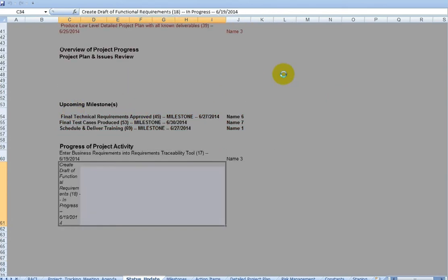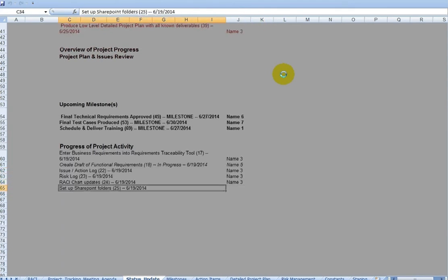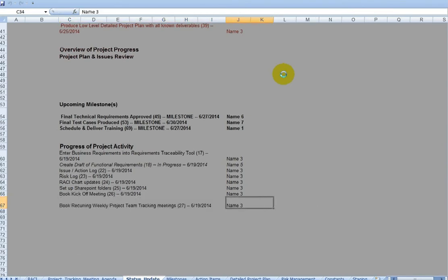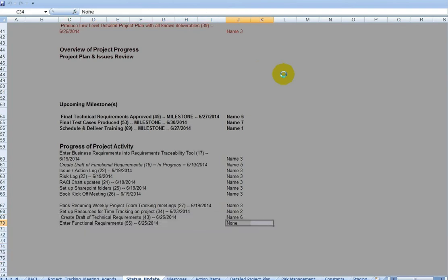So the status report essentially is a mirror image of your agenda. If you went into the meeting to talk about A, B, and C, you want to see on the status report what was the outcome of A, B, and C. Did they all get done? Are they in progress? Are there issues? Do we need to help out?